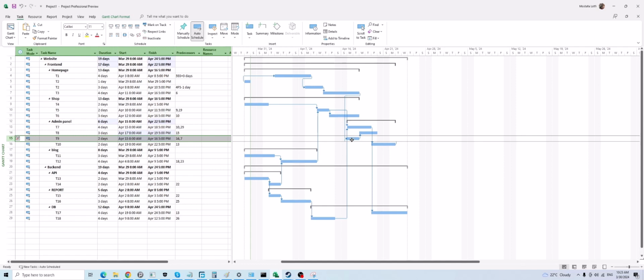So it's a conflict. Now, what you need to do is negotiate with the management. Maybe you can convince them to remove this restriction, or you can convince them to give you more time. If it's not possible, then you need to replan your plan.